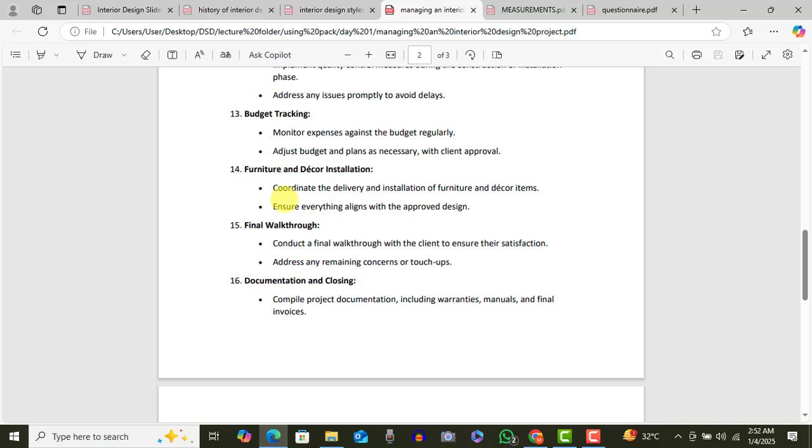In construction, offloading of cement and some of the materials come with cost. You need to capture all those things. Before you summarize it for the client, you need to have your detailed budget. In fact, apart from the budget you do for the client, you also need to have something for yourself, some kind of calculation, so you don't just spend haphazardly. So you need to track that.